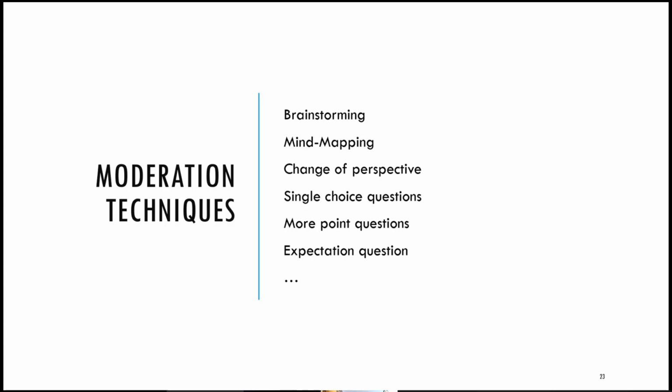Then there is also the change of perspective. I like it a lot because somebody has to get in the role of another attendee. For example, somebody from the IT tries to understand the point of view of somebody from the accounting. The person then tries to communicate what the person thinks the perspective means. We're talking about requirements, what possible requirements in the accounting could be. The real one from the accounting tries to specify this by contradicting or agreeing. So both have to think about requirements and start to express them, even specifying them.